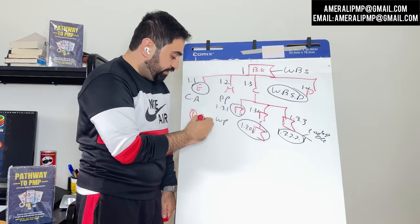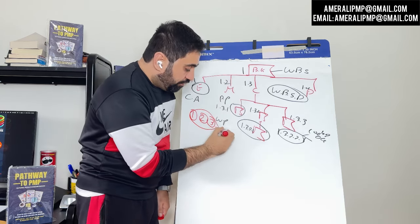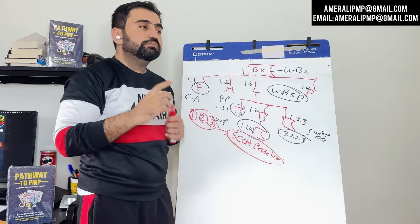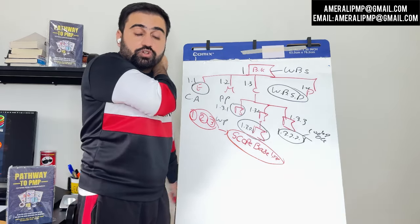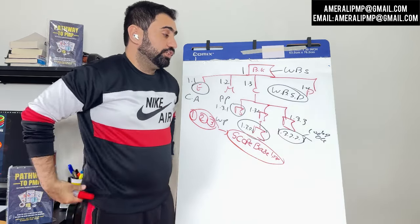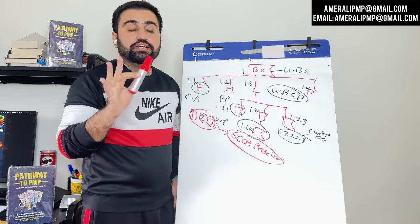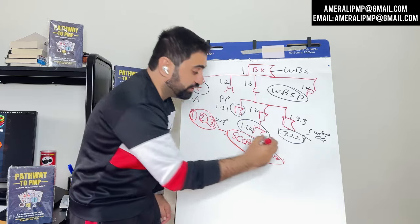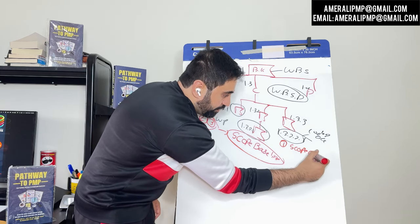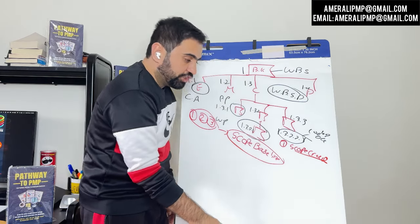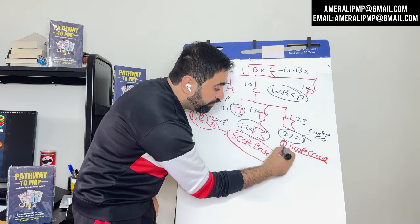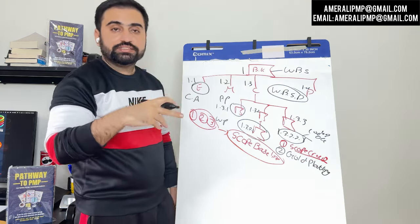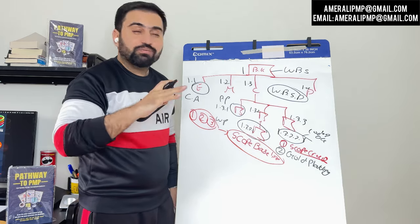So we have the project scope statement, the WBS, WBS dictionary, and code of account. Once it goes to the sponsor and is approved, it is called the scope baseline. Now the scope is fixed. If you want to change anything in the scope, it must go through a proper change control procedure. If the client tries to add anything without going through proper change control, it is called scope creep. If you as a team give more than what was in the scope baseline without it being requested, it is called gold plating. Both are not allowed.